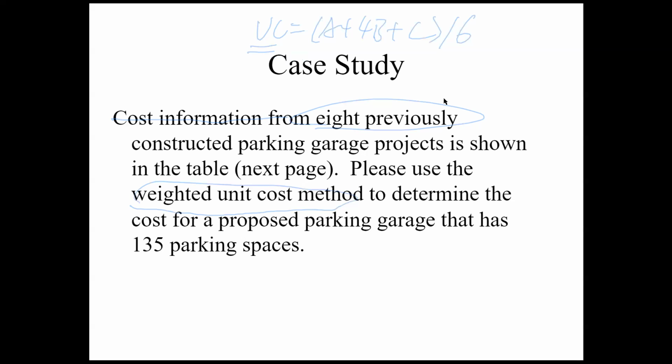So you are going to determine a cost for a parking garage that has 135 parking spaces. So one space costs this. This is only for one space. So then your total cost will be your proposed number, 135, right? And times this UC.